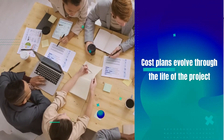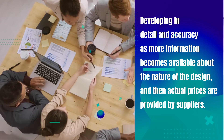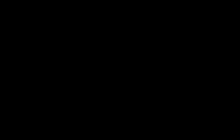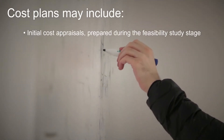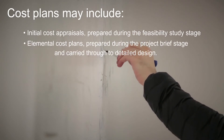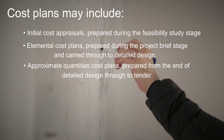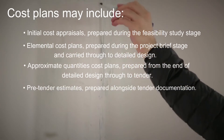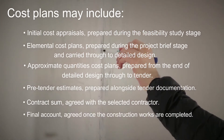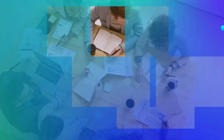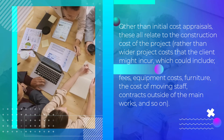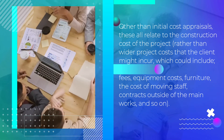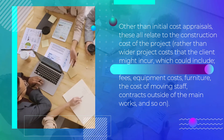Cost plans evolve through the life of the project, developing in detail and accuracy as more information becomes available about the nature of the design, and then actual prices are provided by suppliers. Cost plans may include: initial cost appraisals prepared during the feasibility study stage; elemental cost plans prepared during the project brief stage and carried through to detailed design; approximate quantities cost plans prepared from the end of detailed design through to tender; pre-tender estimates prepared alongside tender documentation; the contract sum agreed with the selected contractor; and the final account agreed once construction works are completed. Other than initial cost appraisals, these all relate to the construction costs of the project rather than wider project costs the client might incur, which could include fees, equipment costs, furniture, the cost of moving staff, contracts outside of the main works, and so on.